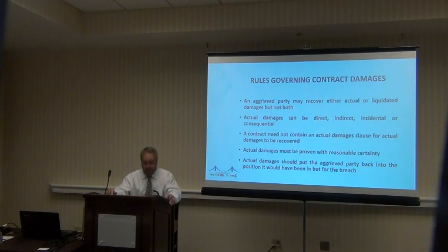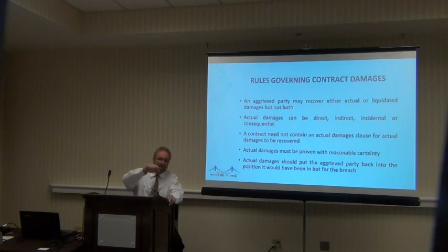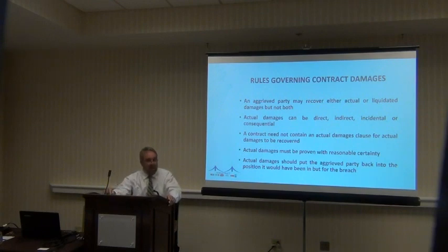Now, here's my next point, the whole reason why people use liquidated damages clauses. It's because we're back to the same question that I asked at the end of the last exclusion of everything clause. Do you want to go to trial and have to put on proof of your actual damages? If it's a complicated damages trial, you could be in the courtroom for 2 weeks, and maybe or maybe not, probably not, getting your attorney's fees. So how much do you want to eat into your damage claim?